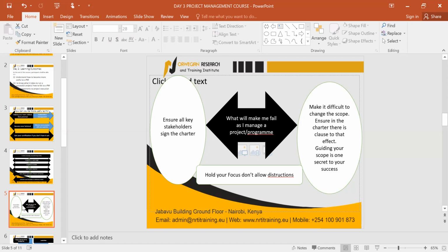And that simply means you have to alter the scope, but you are altering the scope without a change in the budget. If that is done, it simply means you have to look for money yourself, from your pocket, to do what they want. So that is a scenario that collapses the majority of projects. Even if a person has given you a house to construct, as a contractor, you have already quantified that he needs 10 million so that he can construct the house.